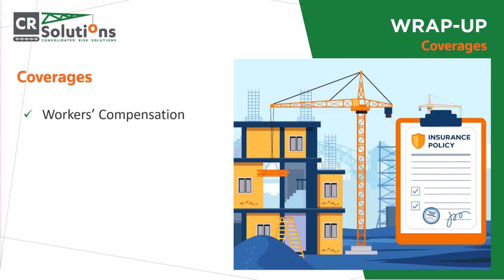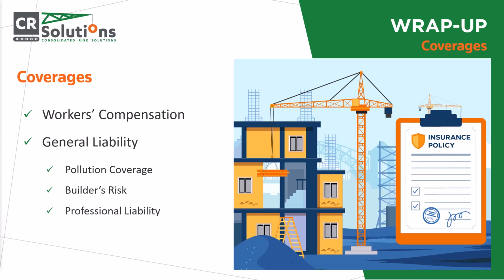A traditional wrap-up will provide workers' comp, general liability, and excess liability coverage. However, GL-only wrap-ups are also an option. These provide only general liability and excess liability coverage. Dirty wraps can also be purchased, which provide pollution liability coverage. Wrap-ups can also include other coverages like builder's risk and professional liability. In fact, there is even a wrap-up product for bonding called subcontractor default. Just about any coverage associated with large construction projects can be wrapped up.